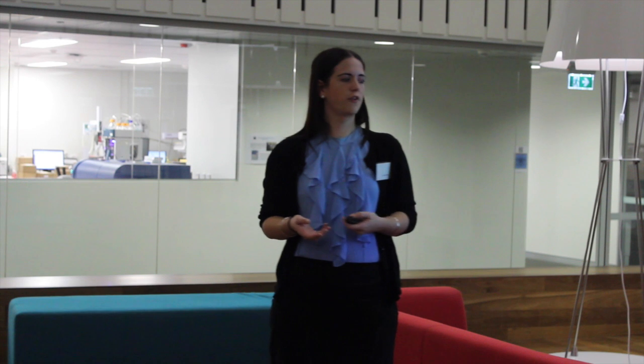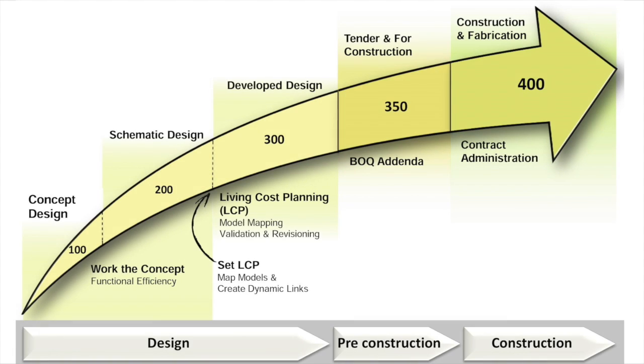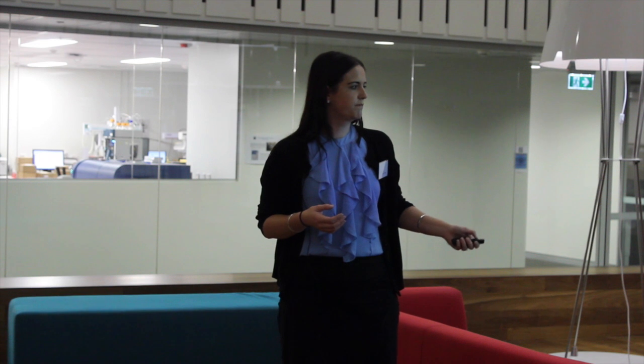So how do QSs work in this world? Taking you through a graphic of our workflow: following along the design phases — design, pre-construction, and construction — and the typical deliverables across those platforms. With models, we work off different levels of development or levels of detail. LOD 100 is a schematic model — very basic and visual, beneficial for the client. Not too much data at that point, but we use it well with estimating and functional efficiencies.